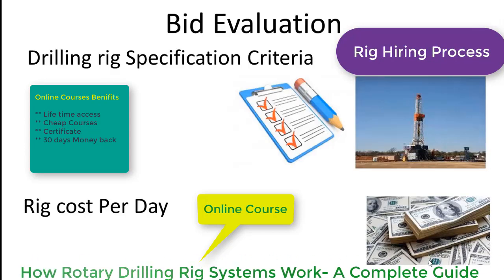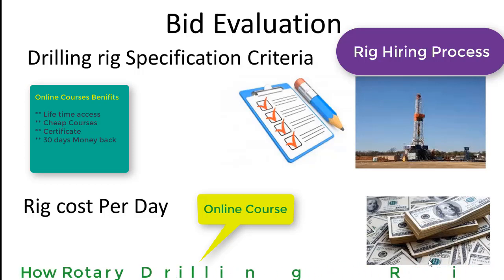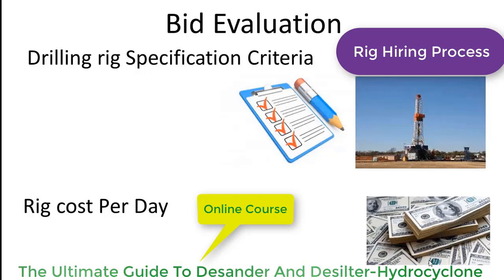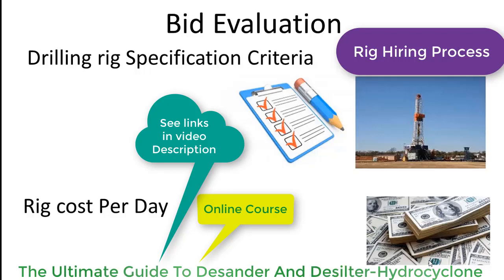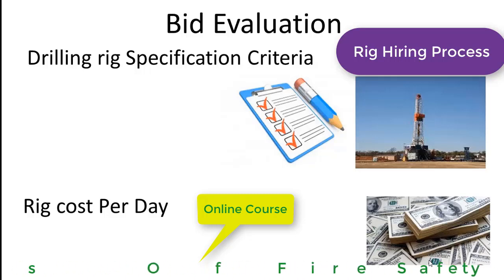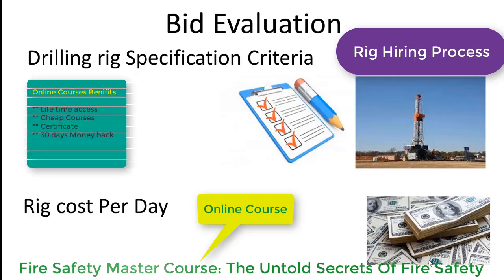Once the operator company receives proposals and bidding from different rig contractors, it will be time for bid evaluation. It is important to note that after the tender is submitted there will be a deadline within which rig contractors are supposed to submit their bidding or proposal. After that deadline they cannot submit their interest in the form of a bidding or proposal. For the bid evaluation, the operator company, with the help of the drilling superintendent and drilling engineer, will evaluate the bids.